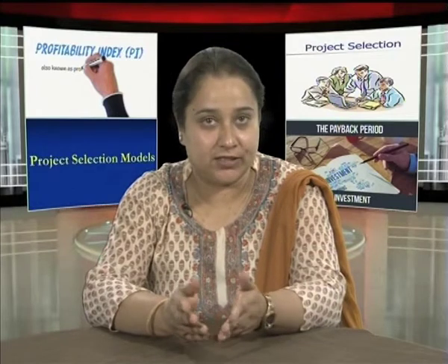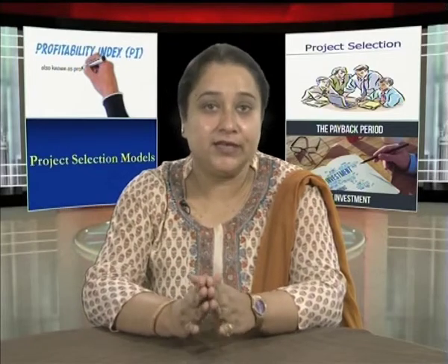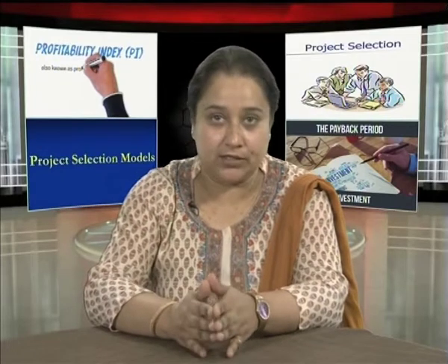Obviously, the higher the accounting rate of return, the better the project. In general, projects which have an accounting rate of return equal to or greater than the pre-specified cutoff rate of return, which is usually between 15% and 30%, are accepted. Others are rejected. It is very difficult to generalize if the accounting rate of return is calculated on the basis of average income over the life of the project.